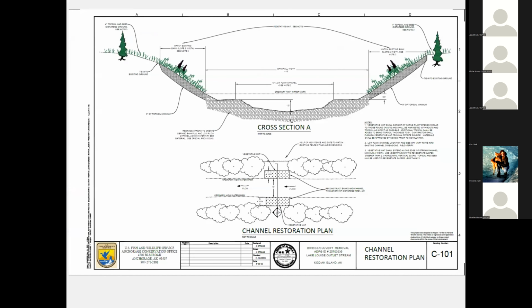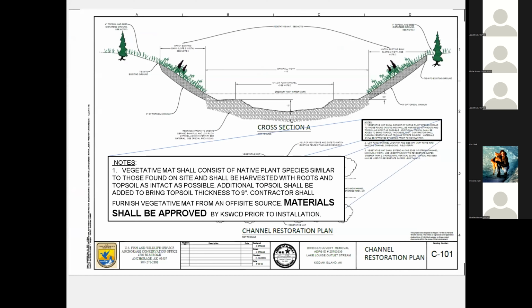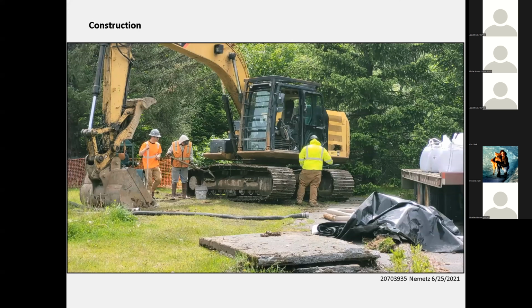I would also suggest putting the wash requirement on the drawing. Unfortunately, that advice is from experience on one of our projects. We did include a note about materials on the drawing, but not the cleaning requirement. Some of the crew only saw drawings and not the full specs. Apparently, they didn't get the word from the boss, so they showed up with mud on their tracks. In this particular location, we did allow them to clean on site. The boss made them scrape the material, contain it, and dispose of it off-site.